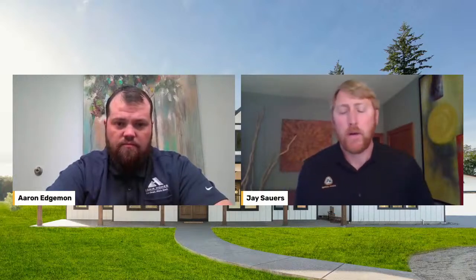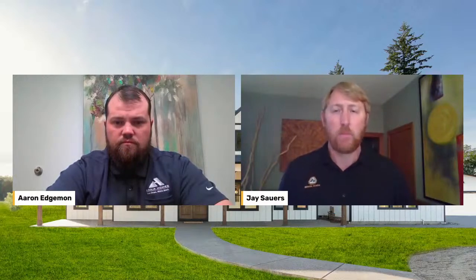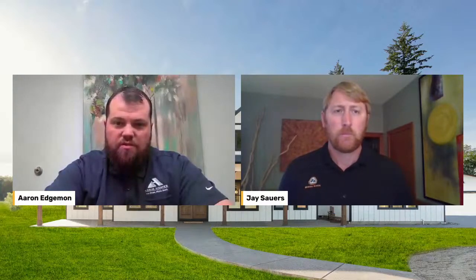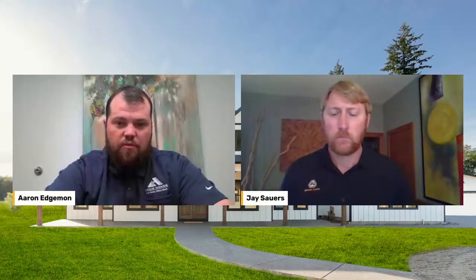Are there substantial reasons why a customer should have a property evaluation completed? Yes, there is, because we want to find out as many unknowns as possible before you get started in the process. You don't want to find out it was a wetland after you've already purchased the property. Maybe during your feasibility time you're figuring out if it's the right place to build, or if it's a flood zone that might need flood certification, to make sure it's within what you were expecting and can execute on.